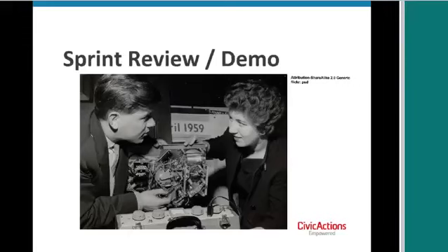At the end of the sprint, the potentially shippable piece of software is reviewed or demonstrated to the stakeholders. And this is a demonstration that is held as widely as possible. It's often good to have users there so that they can actually interact with the software, and the team can observe that and integrate any feedback they get or any observations they make into their future sprints.